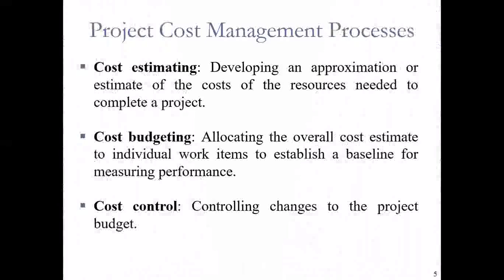Now let's look at the project cost management process. The first one is cost estimating — developing an approximation or estimate of the cost of the resources needed to complete the project. Then there's cost budgeting — allocating the overall cost estimate to individual work items to establish a baseline for measuring performance. There's also cost control, which is controlling the changes to the project budget. As you start doing the work, there will be some changes, but you must be able to manage those changes. Remember: cost estimating, cost budgeting, and cost control.